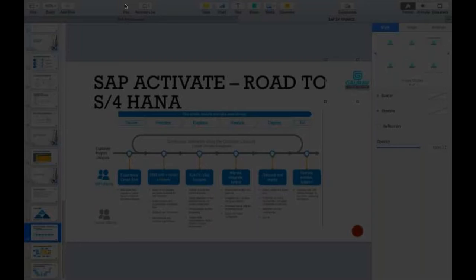But there is one new activity which was not required earlier. In the preparation phase, we were only looking after project management related activities, but there is now one more new thing which was not required earlier. And that is arranging the demo server.